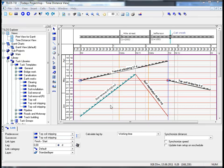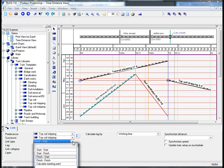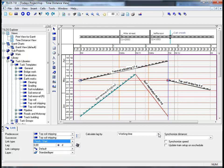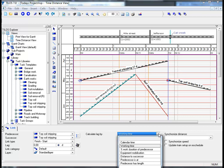Taking a closer look at the TILUS Details Toolbar, TILUS supports a number of different link types: Start-Start, Start-Finish, Finish-Finish, and over and above that, it can calculate the meeting point - meaning two work crews working from different sides. In the Calculate Lag by field, it is also possible to set lags in calendar time or to create distance lags.